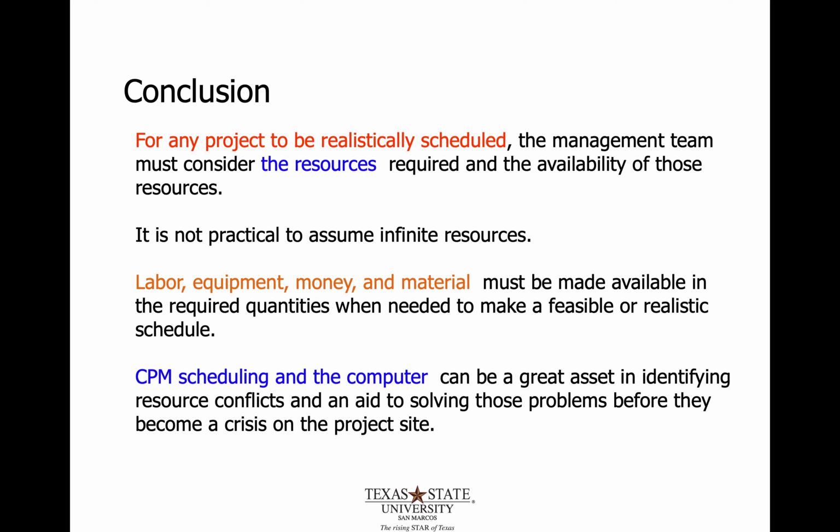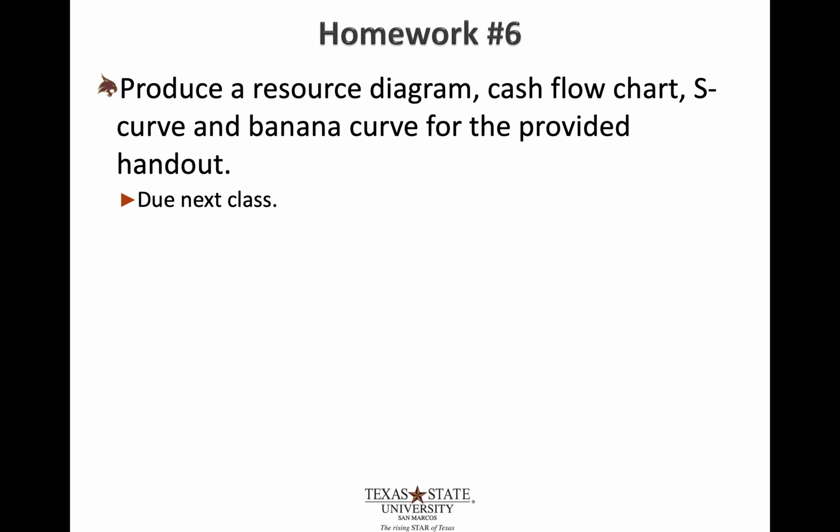The management team really needs to consider the resources that are used. So it's not practical to just assume you have infinite resources at your availability, and it's probably not even a good idea to just maximize out certain resources, because eventually you might exhaust them, or something might break down, things like that. So it's a good tool to go through and understand, link everything to the CPM diagram first, then create the bar chart and create the histogram, and go through and do this process. So there's a homework for this, and there's actually more of an example of how to do this in